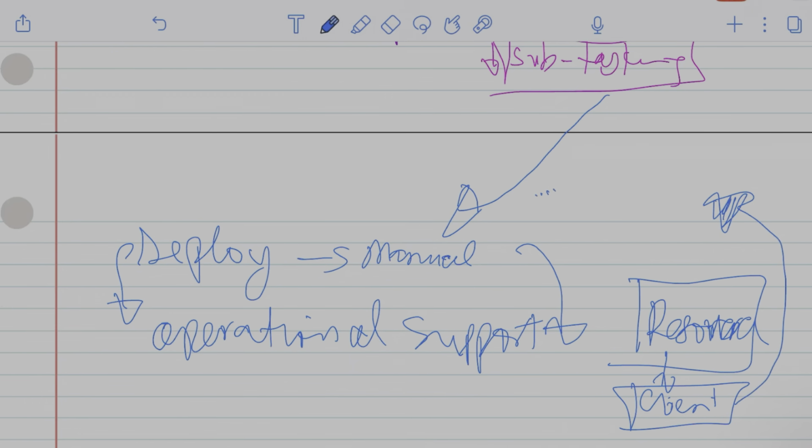What are they doing? They're losing customers. So the organization does not only plan release and end at the level where they deploy to the customer environment, and that is all. They also plan for operational support. And this operational support, the team that actually released it might not really be the team supporting. The organization might decide to find extra resources. Because if the team that is at the level of releasing it is the one still supporting, this might take away capacity from them. But if this is planned as part of their work, then it's okay.